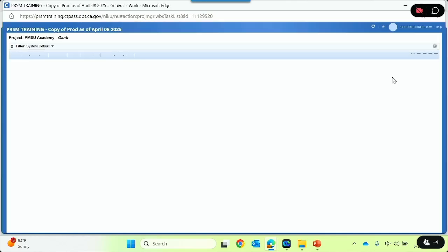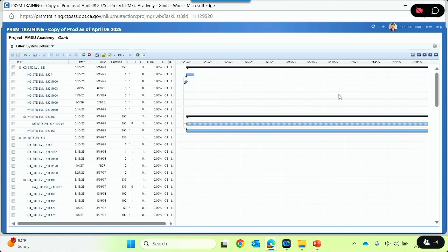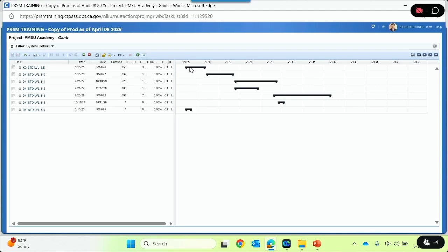As we saw in the slides, when you're verifying whether the project schedule is right or wrong, these are 70 different tasks. You're verifying almost 140 different dates. That's too much. If you're looking at the Gantt, you can tell if it doesn't follow the sequence, that means your project schedule is off. Here you can see after phase 0 begins, after 0 ends, phase 1, 2, and 3 follow. But if you're just looking at the schedule by itself, it's too many dates, it's going to be a little hazy on the eyes. So that's the use case scenario for this Gantt.